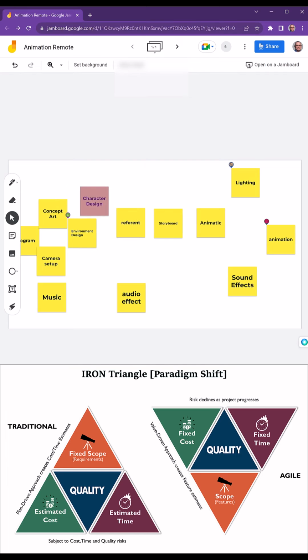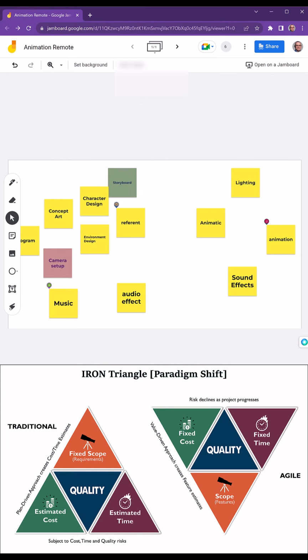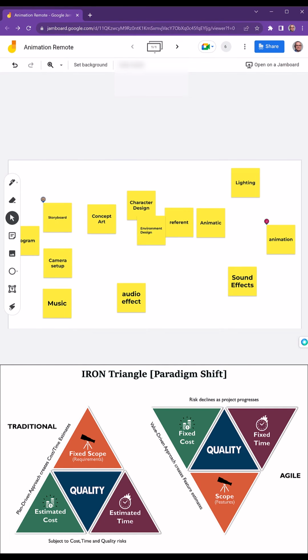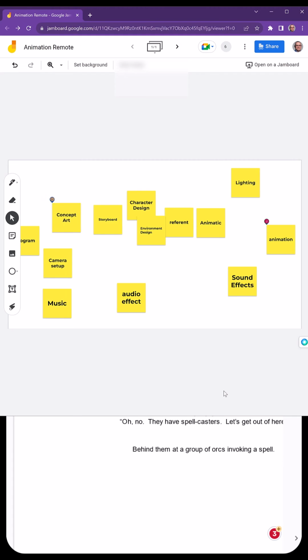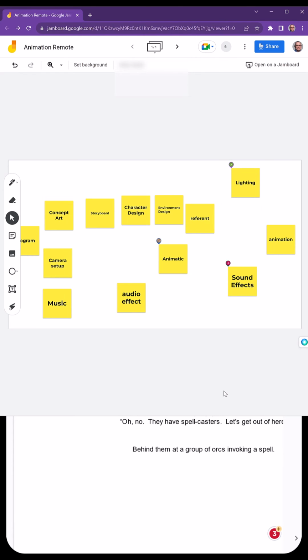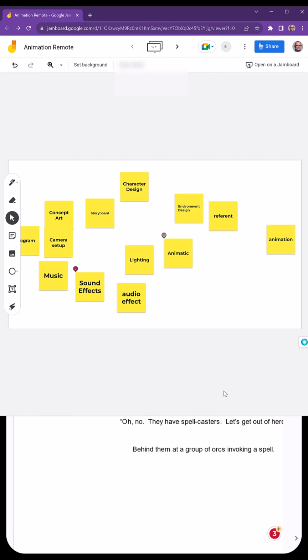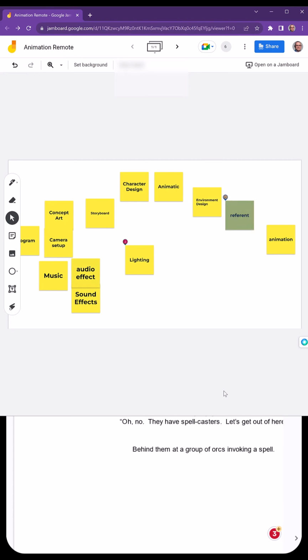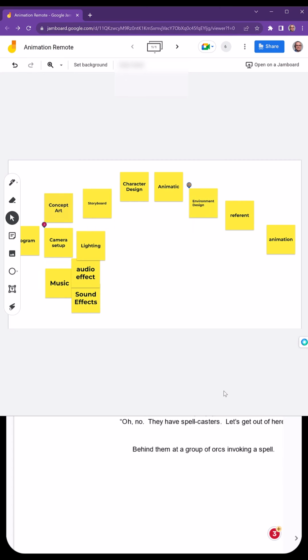In this particular case, we know that time is the most important factor because it has to be done before the final. So time has to be set. So we might have to spend some more money on it, or we might have to drop the quality or leave a scene out of our story to be able to get it done on time. It's critical that we make full planning and know what can be adjusted and what cannot be adjusted.